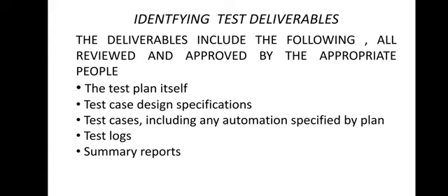The first one is the test plan itself, which should be delivered as a master plan. Point number 2 is you have to specify all the test case designs. Point number 3 is you have to also set the test cases as output, including any automation that is specified by the plan. You have to produce the test logs and test summary reports. So it is all about what we have to deliver in this step.